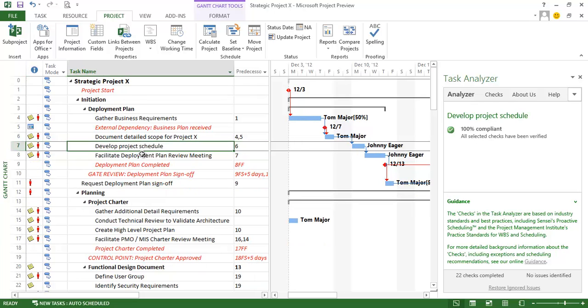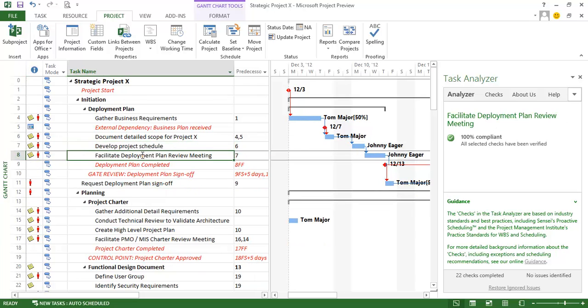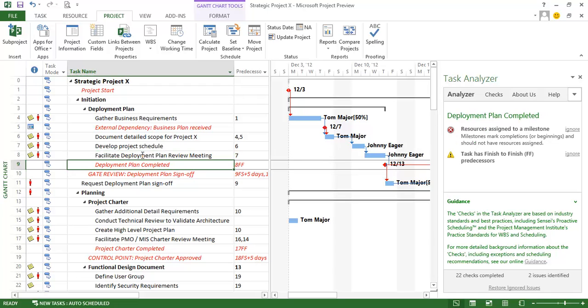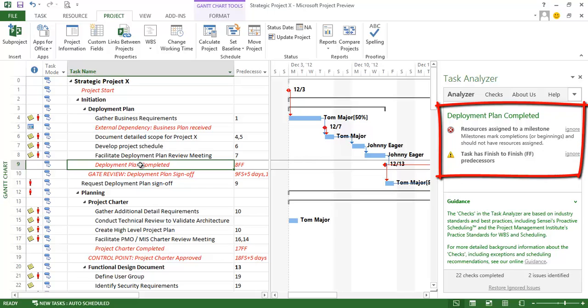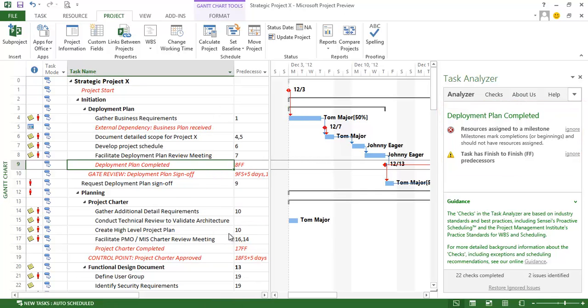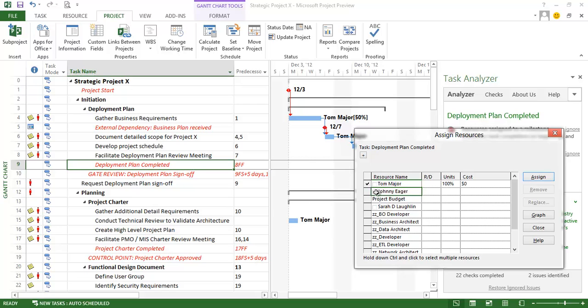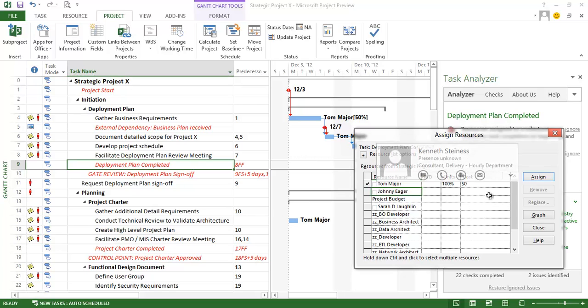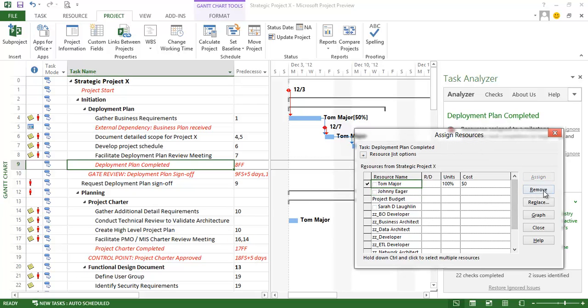And then let's move on to the next one. Develop project schedule. That appears to be in compliance. Facilitate deployment plan review meeting appears to be in compliance. And then I have a milestone here that has a couple of issues. One is there is a resource assigned to it. And of course I shouldn't have resources assigned to milestones. And again this was a mistake so I'm going to go ahead and remove this assignment.